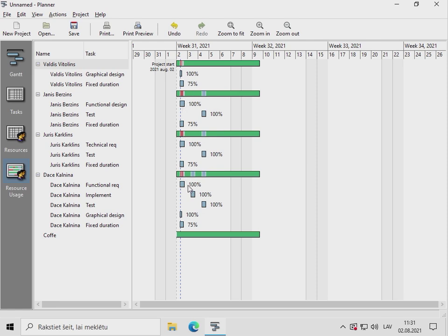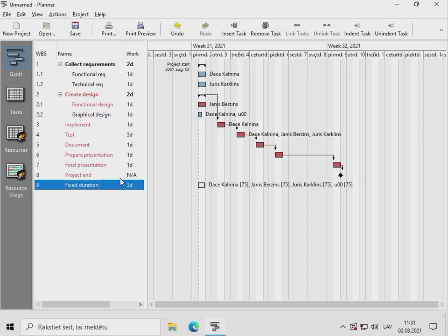And if you already plan for overtime, then the probability is very big that you will not get everything done in the planned schedule. So everybody should have 100% work to do, so no too much waiting time doing nothing, but also everybody should have only 100%, not more, so that there is no overtime already planned into the plan.